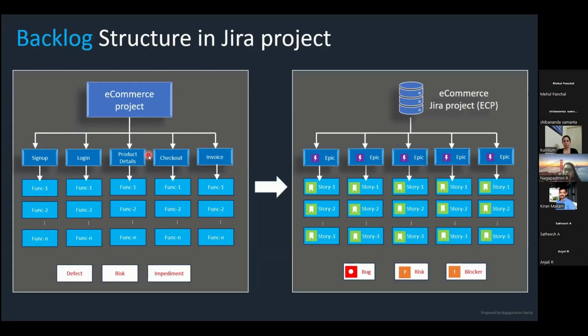My suggestion would be to break it in a way that you have bare minimum story points on each of the stories. A story does not always need to be end-to-end, because if you put 8 points on a story and push it to the next sprint, all the 8 points will go as a spillover, because Jira currently does not have a mechanism to capture the spillover.